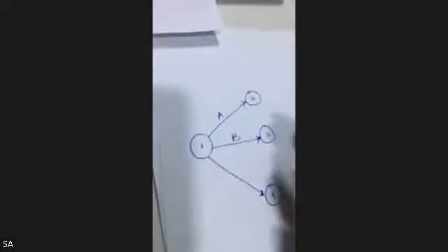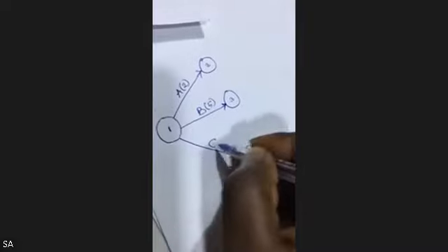So let's attach the duration. We have 2 for A, 5 for B, and 4 for C. So we have 2, 5, and this is activity C, we have 4. Now, the next thing you need to do is this. Ask yourself, class: D starts where B ends. That means B precedes D. B comes before D. Take note of that.